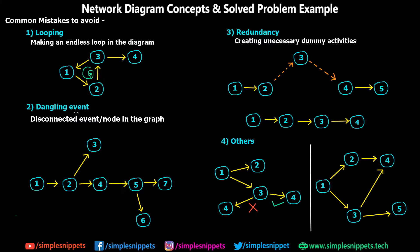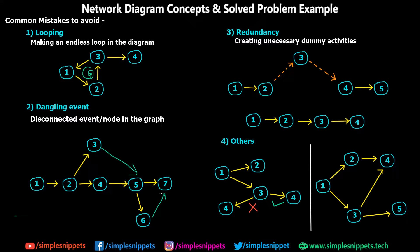The second mistake is a Dangling Event — you are not supposed to let an event stay dangling or disconnected. For example, if you have nodes 1, 2, and 3, and node 3 is left disconnected, not involved in any further activities, that is not allowed. We have to have a connected graph. Similarly, if node 6 is left disconnected, we have to connect it.